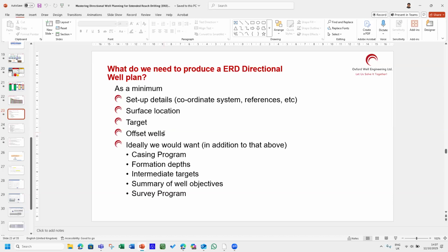Draft is just a line in the sand. You will change it. Somebody will say, okay, change the target. Early days of planning, you have look-see plans. Look-see plans are just trial and error. So the very first plan will be look-see one. Then somebody said, okay, move this, move that, change these places and make this look-see two. And there will be some more shifts and bends. Somebody says, look, C3. And after a long while,